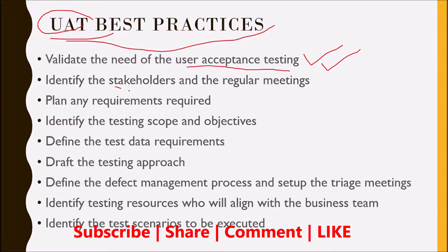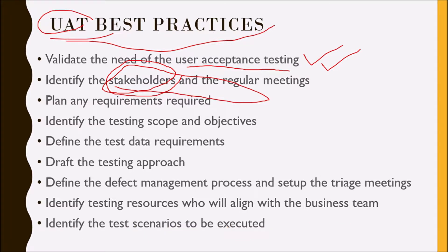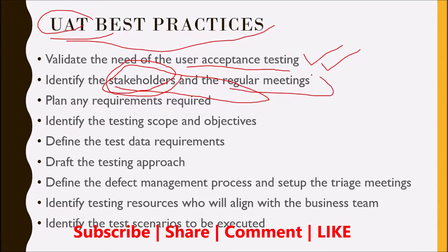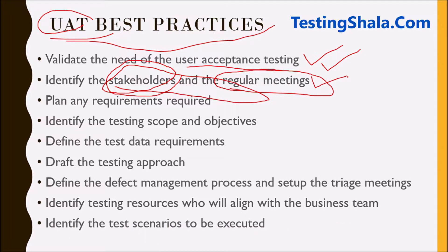If UAT is required, we should identify the stakeholders who are going to perform UAT. Normally UAT will be performed by the end users or clients. The support we should provide from the testing team includes environment readiness and all necessary information. We should also set up regular meetings with them to get status updates and help them on any issues.